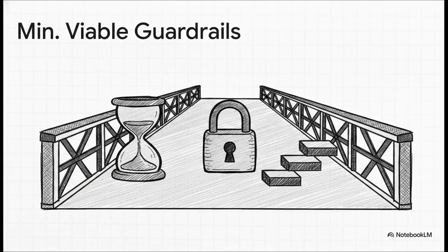Non-negotiable guardrails to execute this minimum viable implementation without halting operations. Specific guardrails are required. Absolute executive buy-in. Senior management must champion the project, allocate dedicated capital and human resources, and enforce strict discipline across all functional departments. Realistic project timelines. Schedules must reflect the actual complexity of data migration and the absolute necessity of comprehensive testing.